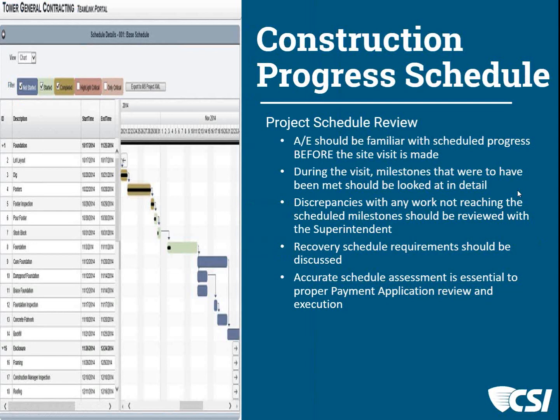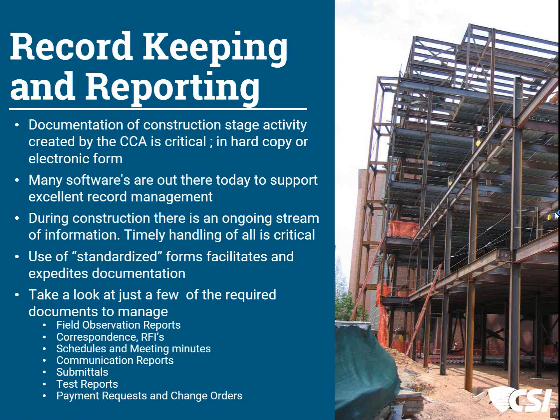So let's look at the next slide, Matthew, and touch on record keeping and reporting that go along with site observations. Sometimes there are electronic forms or hard copy of what stage of activity is critical here to the project. There are a lot of software tools out there today to help support record management, capturing sections, components of steel erected. This slide is about using the tools that are out there and available to you that the contractor may share, so that you're able to document that he had this project phased, and these phases are in place and that's ahead of schedule. These phases are not, and that's behind schedule, but overall things are moving according to schedule, and things are working okay.